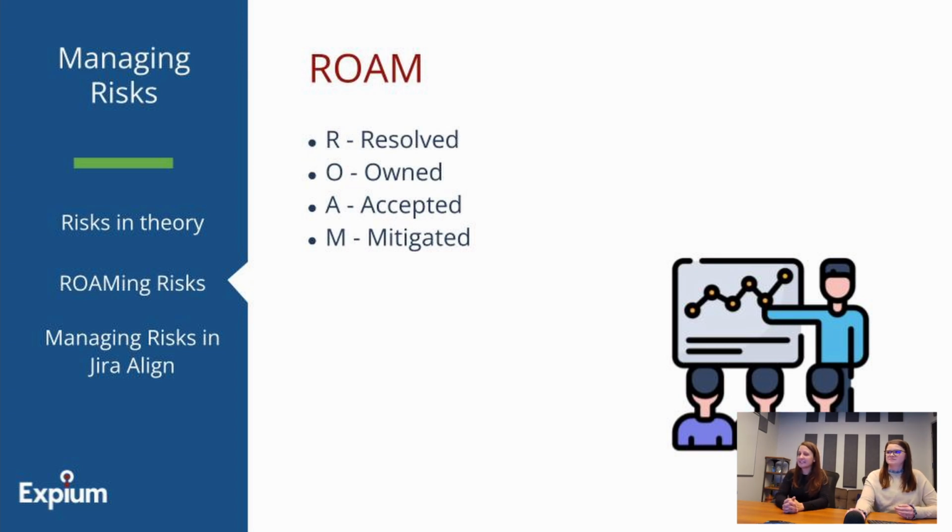Mitigating is a fancy word for lessening. So anything we can do to help the situation and make it a little less risky. So going back to the example of being short-staffed, can we mitigate that? Well, you could hire contractors. You could ask if there's another team who could help you. You could potentially ask the business if you can get more time. Or, I hate to say this one, but does it make sense to cut scope? These are all things that you could be asking.